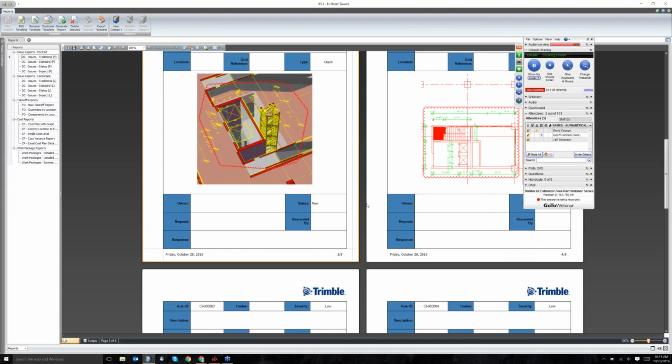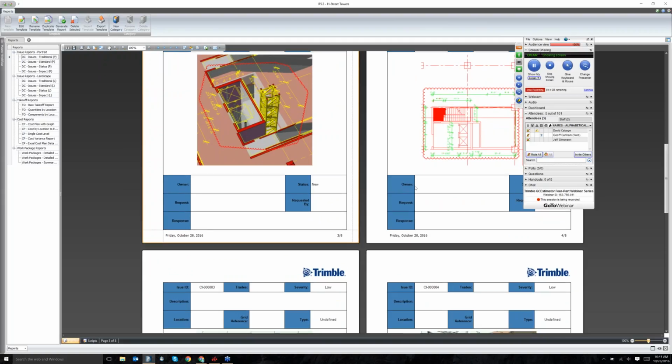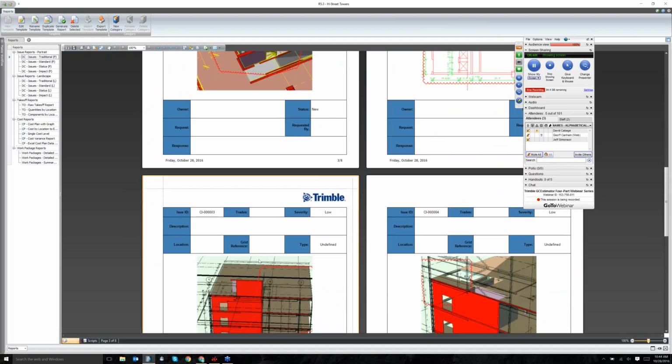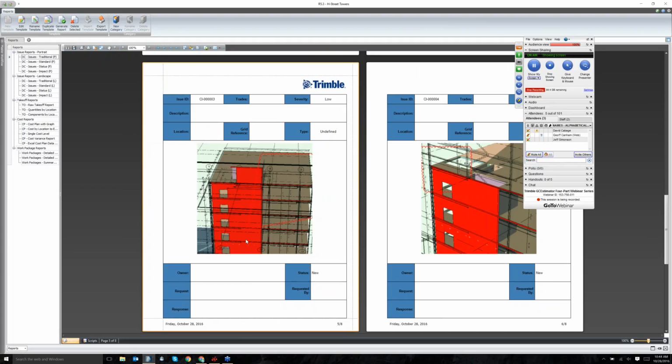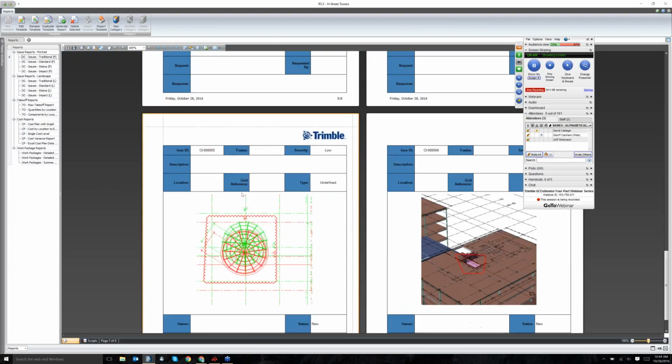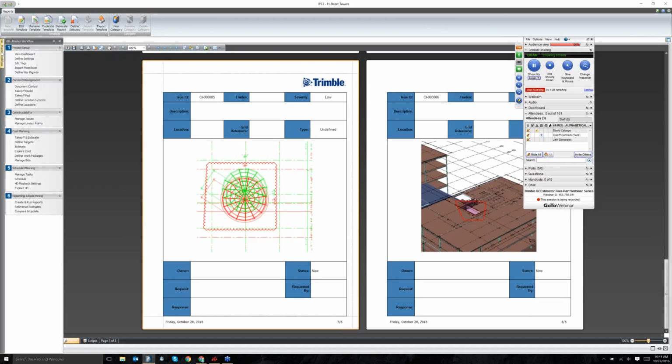Anytime they encounter an issue, they create a bubble, give it an owner, saying, hey, Mike's got structural, I've got the exterior skin, and everybody's issues get distributed to them at the beginning of the week, maybe the week that the project's due for bid. So it can be easily tracked, and sent to the architect, engineers, whoever is the person that really needs to address the issue.